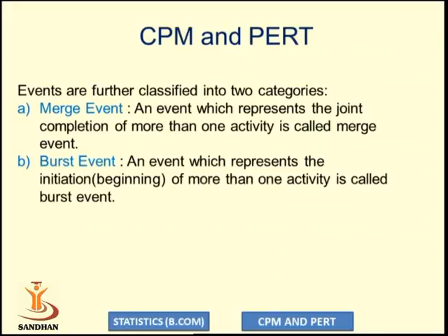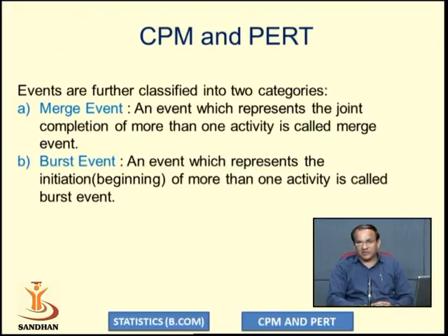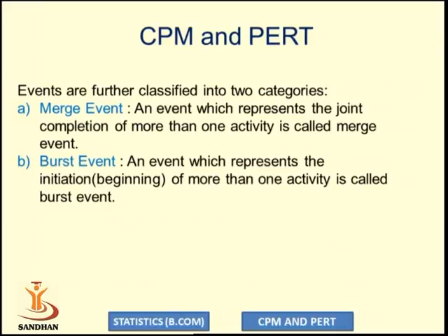One is the merge event and another is the burst event. A merge event is an event which represents the joint completion of more than one activity, and a burst event is an event which represents the initiation or beginning of more than one activity. Let us see the graph.